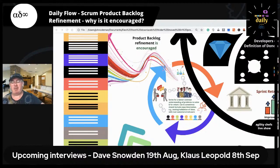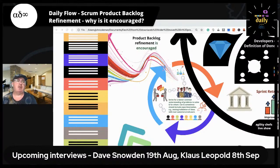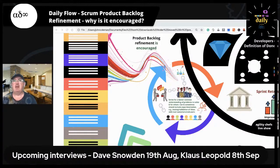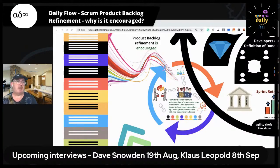They were Scrum teams. But I did have a big fail with one team in particular. I was at a sprint review and we went through the agenda of the sprint review, as you do. And at the end, someone said, 'Why did you build this? We tried it last year. It doesn't work.' And there was a collective head-in-hands moment. So that was a reminder for me that it's important to talk to stakeholders, including real customers and end users, before you build something rather than after. Because with a high quality definition of done, it's quite expensive to deliver things in Scrum, so maybe it's sensible to have a conversation before we actually build what we're being asked to build.